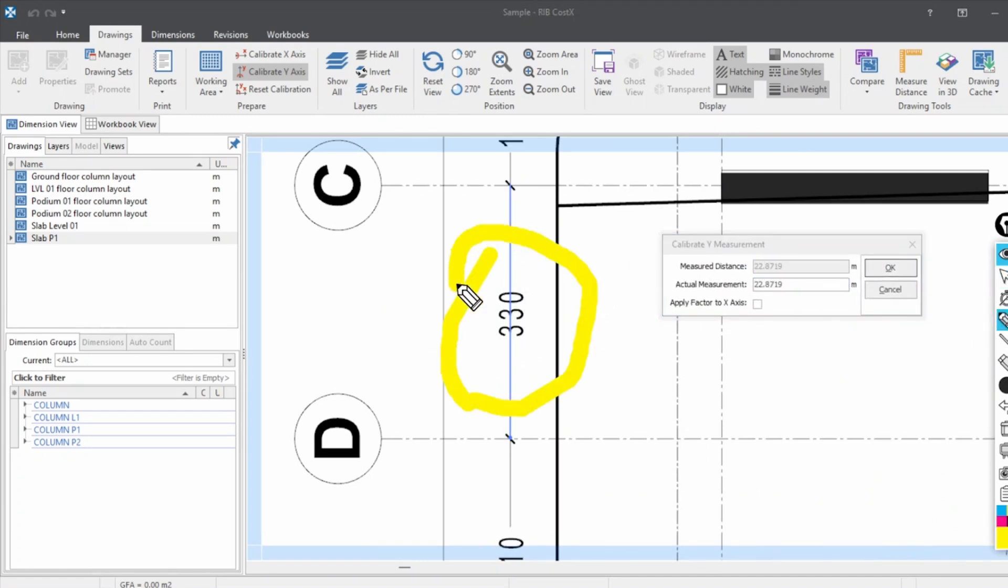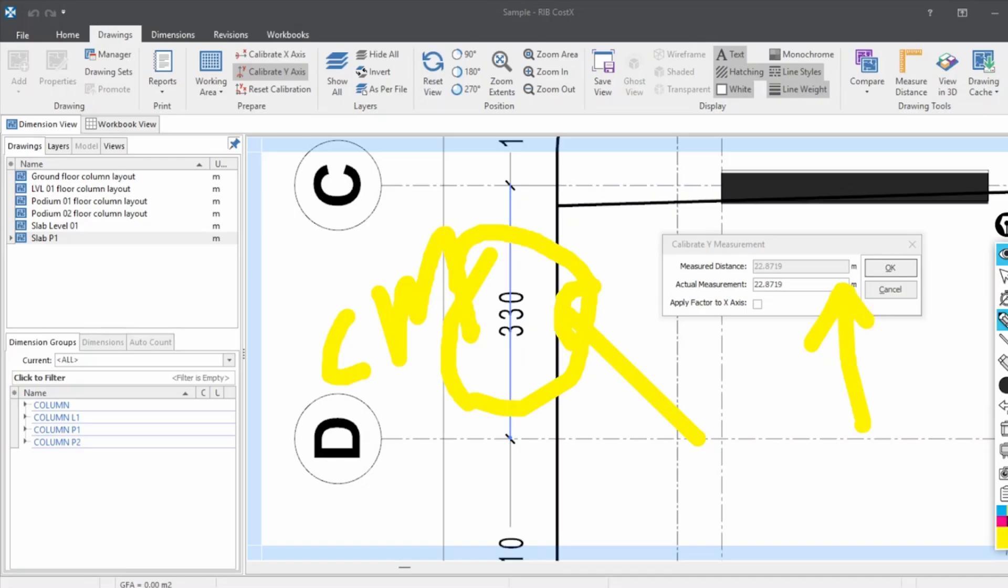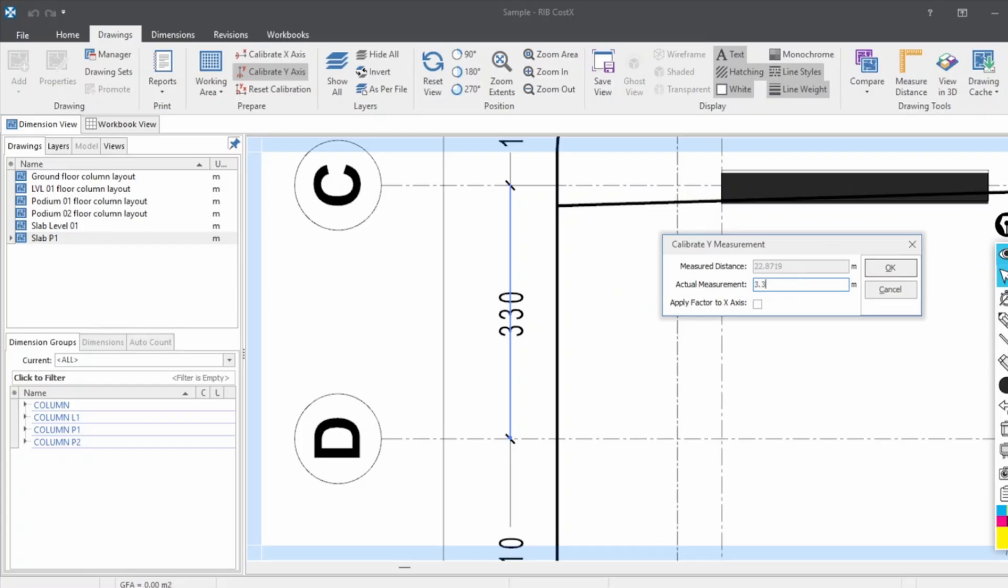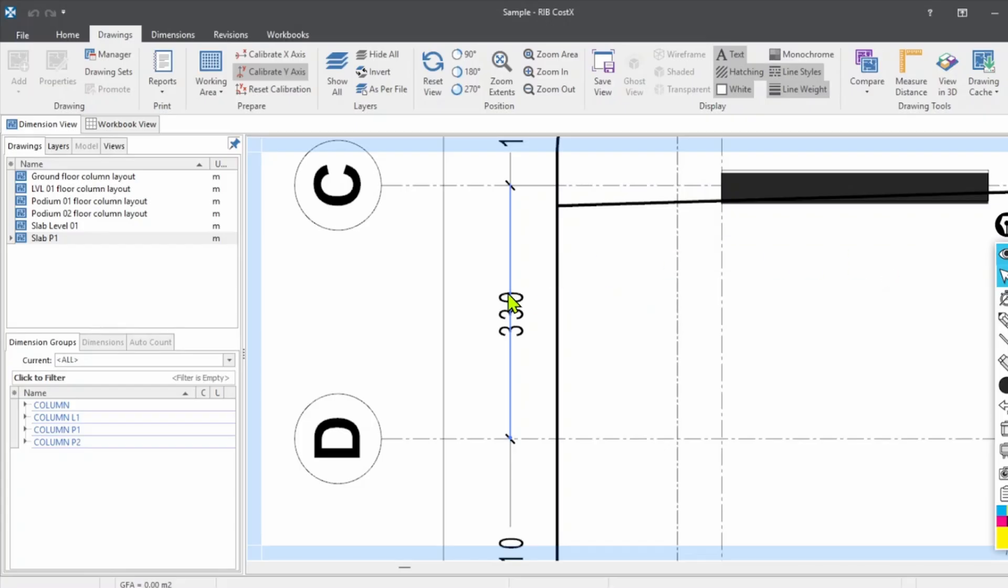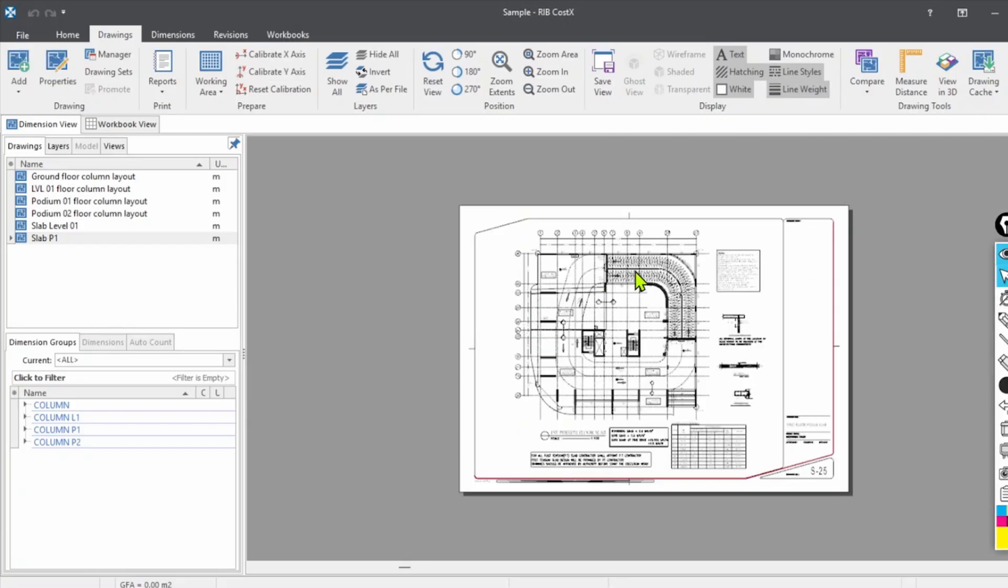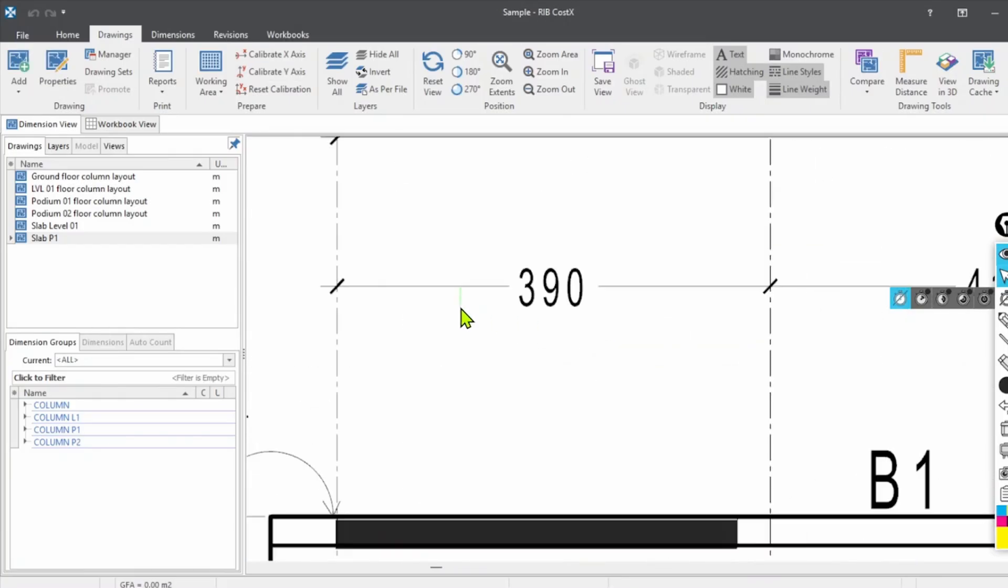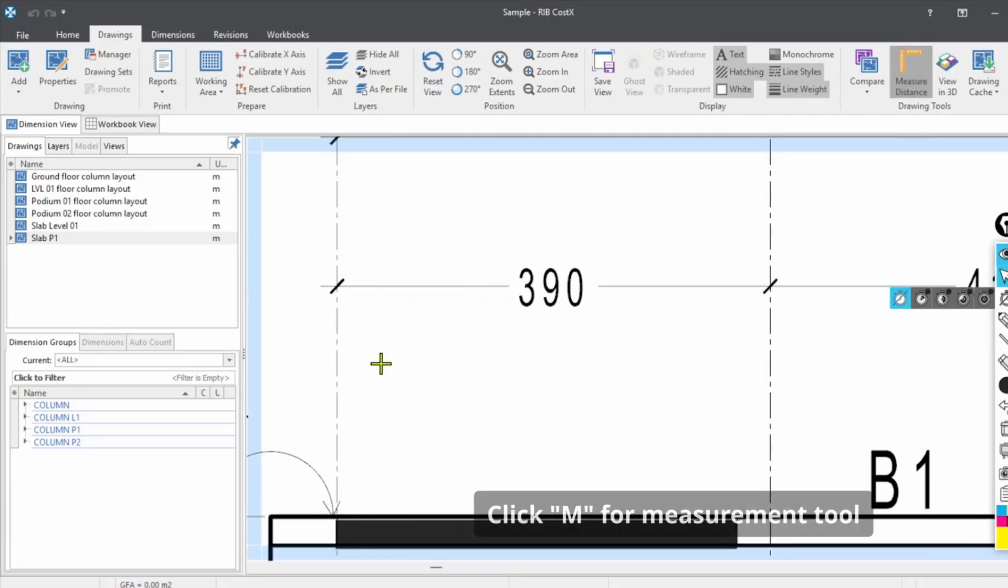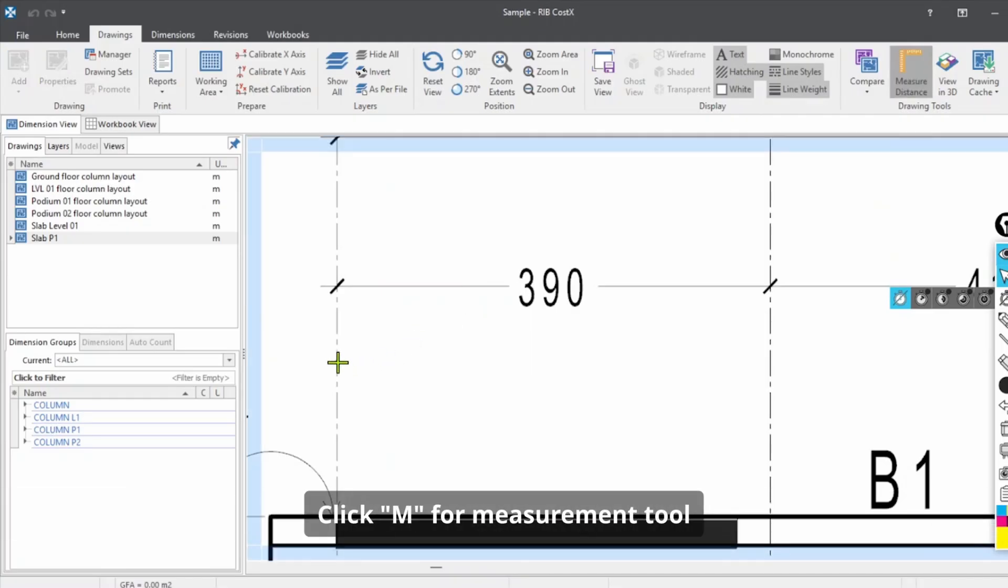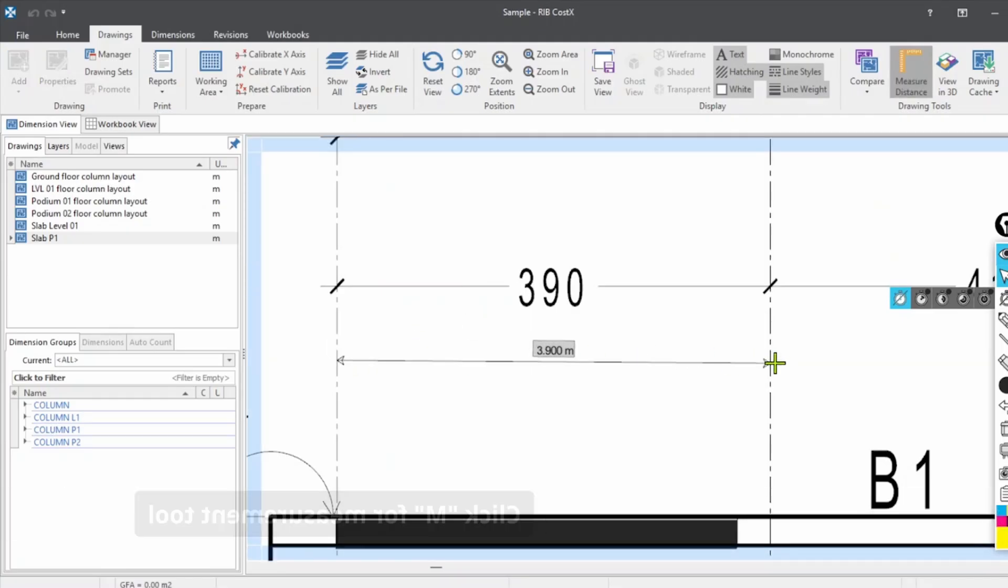Now calibrate Y-axis. Choose this measurement, click here until here. You can notice this is 330 centimeter in the drawings, and the units are in centimeters. Here it is in meters, so keep in mind while doing the conversion: standard is 3.3 meters. To verify the scale, click M for measurement, and you can check it's 3.9 meters.